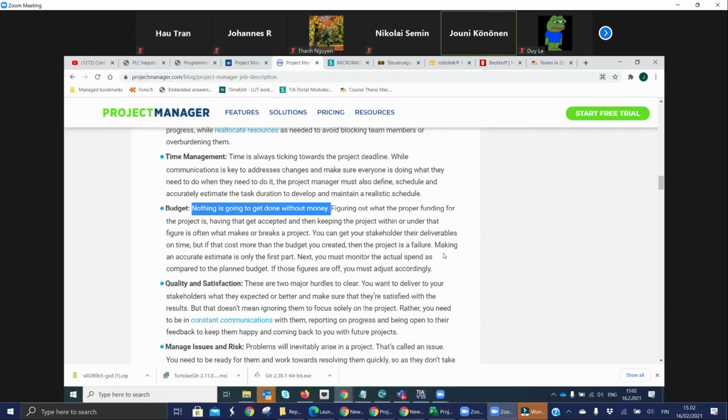Human work costs a lot. Of course, if we are building a paper machine, the equipment costs too, but finally, looking at the whole system, human salary payments are most of the costs you have on a project.